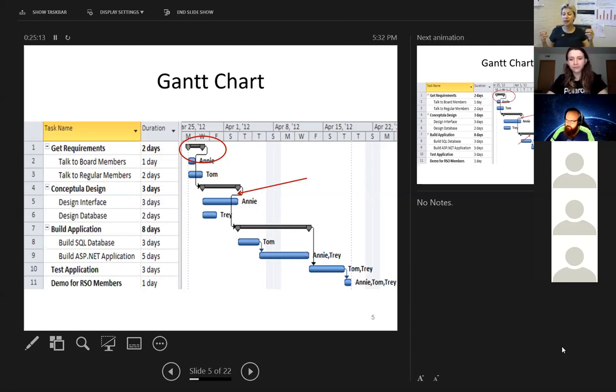Yes. So the reason if you're one person, you do them one after the other is because your hands are busy doing one thing. You can't do both of them at the same time. So this is the second type of dependency. Your resources are busy. You don't have four hands. You only have two hands. If you had four hands, one person could start from the left, put the veggies, and the other person could start adding the cheese on the top. But resource dependency is another type of dependency.